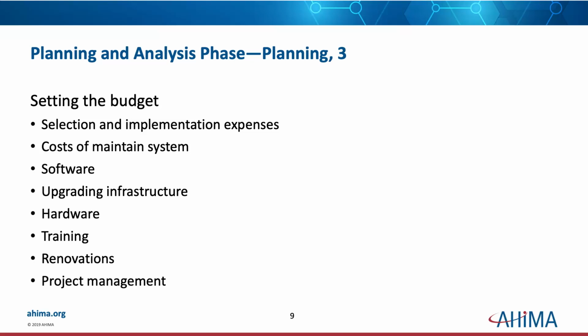You have to know selection and implementation expenses, cost of maintaining the system, the software, upgrading infrastructure, hardware, training, renovations, project management. And on top of all that, you have to know what your reimbursement is going to be down the line. What is your profit margin going to be down the line?